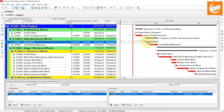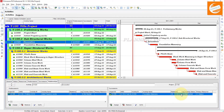You can see here that the relationship before was Finish to Start. Now it has been changed to Start to Start with a lag of three days. This is how you can change the relationships manually.